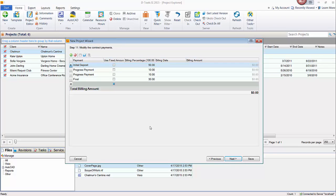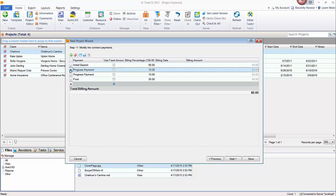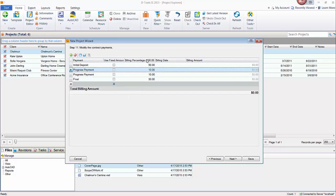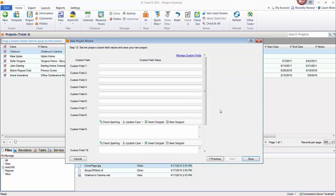Here you'll see your contract payments. The list, again, this is pulling from the control panel. And you can modify this per project if you'd like. You can always modify this later as well. But if you know the payment schedule at this point in time and if it's different from this, go ahead and use the buttons up here to delete lines. And just make sure this column equals 100%.